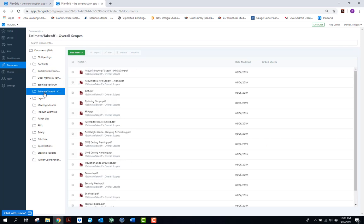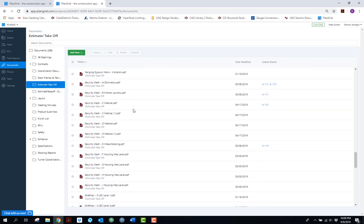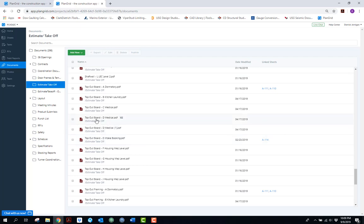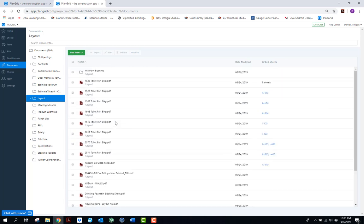From my estimate takeoff I printed from OnScreen, I broke everything down into a format allowing the foreman to pull up the estimate at any point to check scope of work — what's ours and what's not — navigating it through the actual takeoff from OnScreen and QuickBid. There are also specific layout files with rough openings for framed openings, and other pertinent documents: the schedule, site-specific safety plan, RFIs I'm constantly uploading and hyperlinking to drawings, and specifications I go through and highlight so anything non-standard is at the team's fingertips.